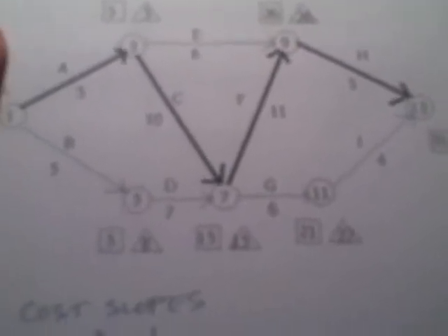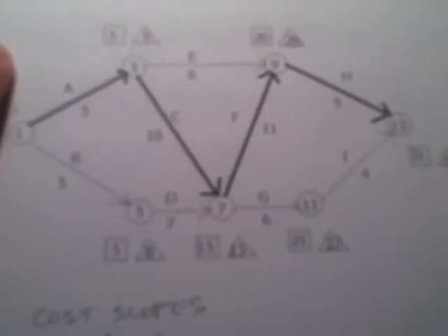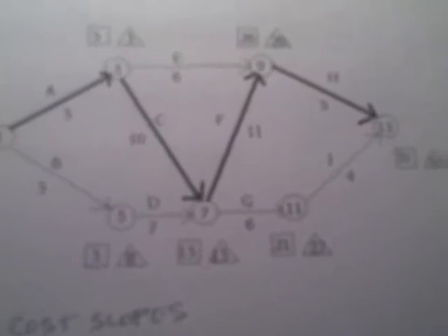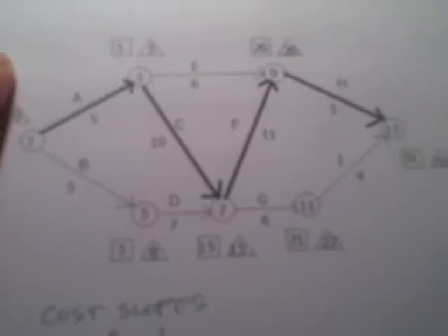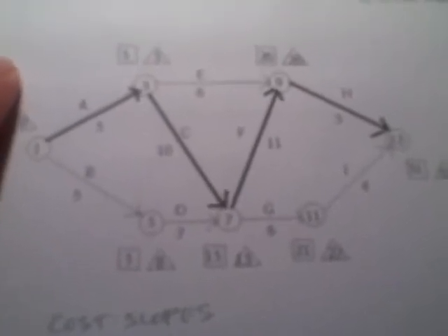The other thing which I have not shown here is to calculate the least time to complete this project, which was question number 2 on the assignment. And what you do is you simply replace these normal times with the crash times in the table, reschedule the diagram, and determine what that is. And that gives the project manager an idea of how fast this project could be done if everything was expedited. Naturally, you don't want to do that. It's going to cost more, but oftentimes it will be a question that comes up, and it's easy to do.